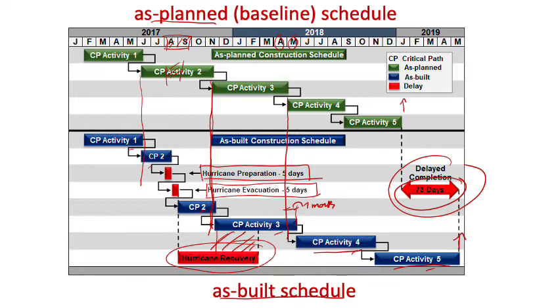So based on the original plan, you got this estimate based on your guess on the production rate, but actually production rate is much slower. So that's why it takes you more time to complete 4 and 5. So could be the errors in estimating production rate, right?